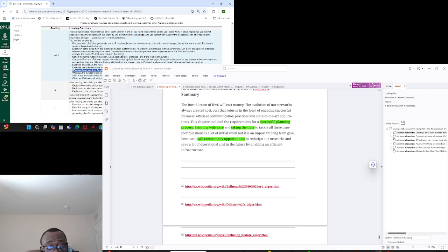So once you have this, the approach is there. You've separated your network. You stated a business case. You've looked at the approach you're going. The first thing you got to do is you want to look at planning. And in planning, the first thing you want to do is follow your existing change processes because every company has its own change management processes, which talk about what are the essential things that are required before you do a change, levels of approval, what is the quality assurance test that needs to be done, and all those things. So you need to evaluate all that in respect of IPv6.